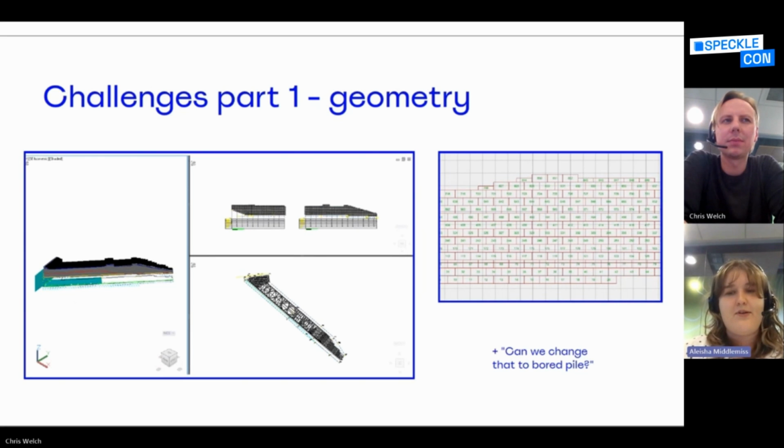We wanted to be able to turn around major design changes in a matter of hours. Each of the 12 retaining walls became more and more complex, and often decisions were made that were bespoke to each wall. This meant I had to move away from using one Grasshopper script for everything and build one per wall.